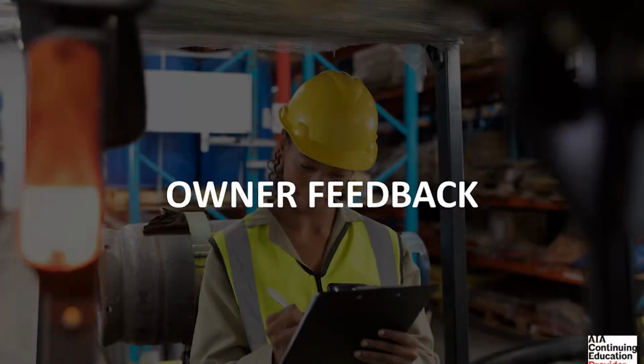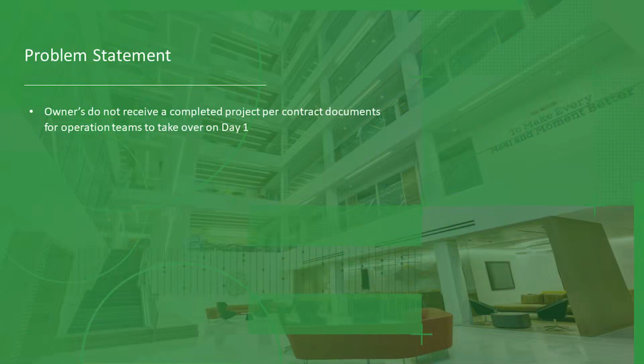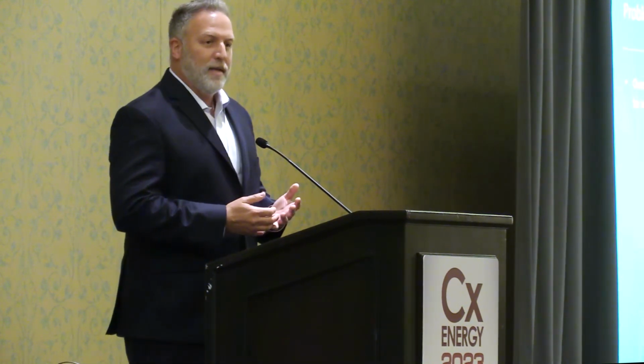So let's go to Derek for the owner feedback. Thanks, bud. One of the bigger problems I always see on the owner side is that we never receive completed project documents at the end of the day. I see some faces like, really? That happens? Show of hands, do we have any building owners in the audience? We got a couple, right? What we get is hard copies and a mix of electronic copies, stored in different locations: SharePoint, OneDrive, Autodesk, BIM 360, whatever it may be. That's a challenge for us when we transition to operations and maintenance.